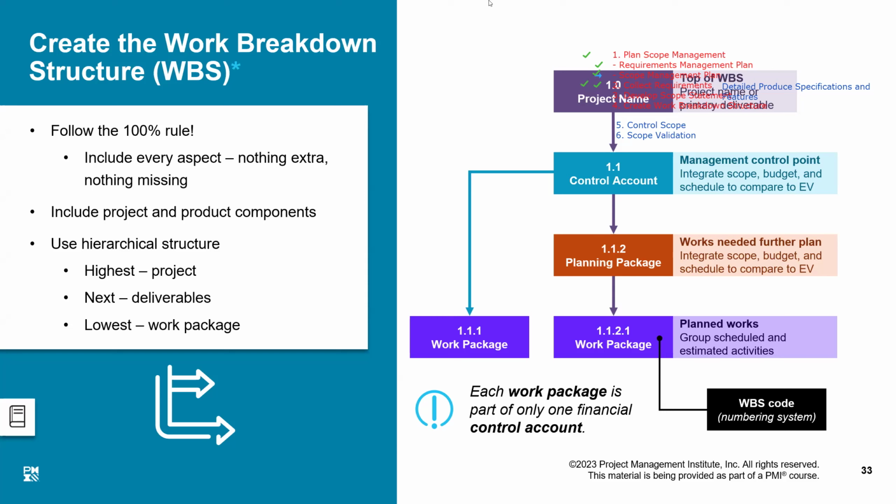So that is actually tied to the payments for each activity. And that is a very good way of doing it. But I don't stop you from breaking it down into other rules of your own. You could have a 50-50 rule. You could have a 70-30 rule, or 30-70 rule, or 80-20 rule, or 20-80 rule.